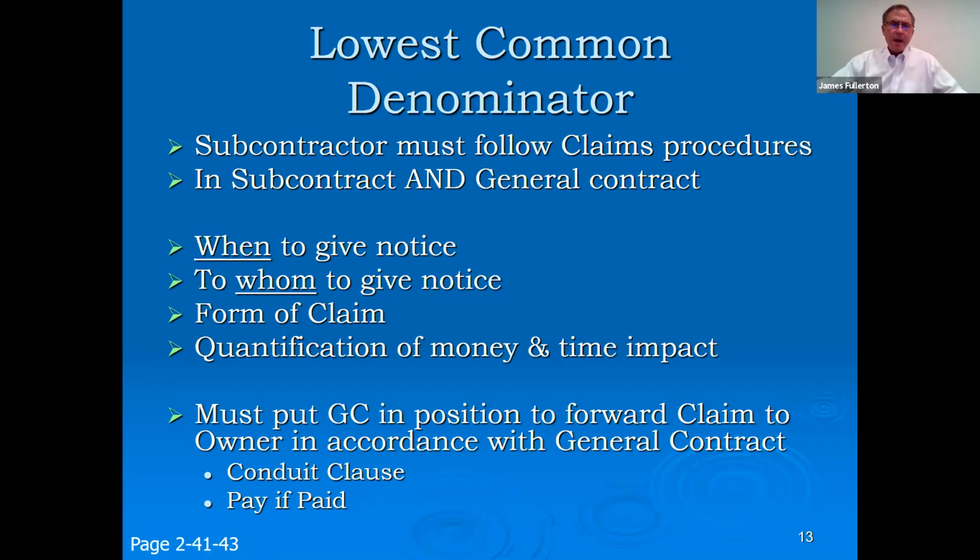or more likely their attorney. But you know, I hear them saying, yeah, but you told us to do this and it caused a delay, and or the owner issued these revised plans and specifications, and that caused a delay and it caused extra money. But my response might be, yes, but my general contract required me to give notice to the architect and to the owner within 3 days of the event, and you didn't get it to me until 10 days after the event. You put me in a position where it was impossible for me to collect for that change from the owner. And so now you're asking me to just come out of pocket for that money.